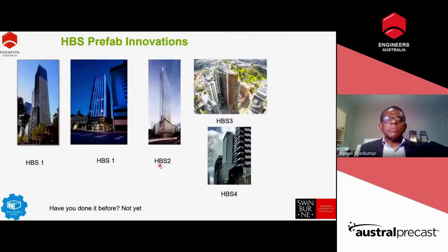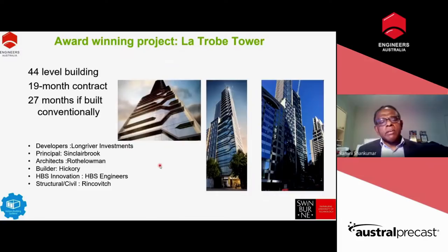Then, prefab innovations guys, I want to take some time to explain a few of the case studies. We have done marvelously well with the precast systems. We have used it on a prefab construction. It's a 44-story building, and it would have taken 27 percent more time conventionally, but we finished in 19 months. It is a simple thing.